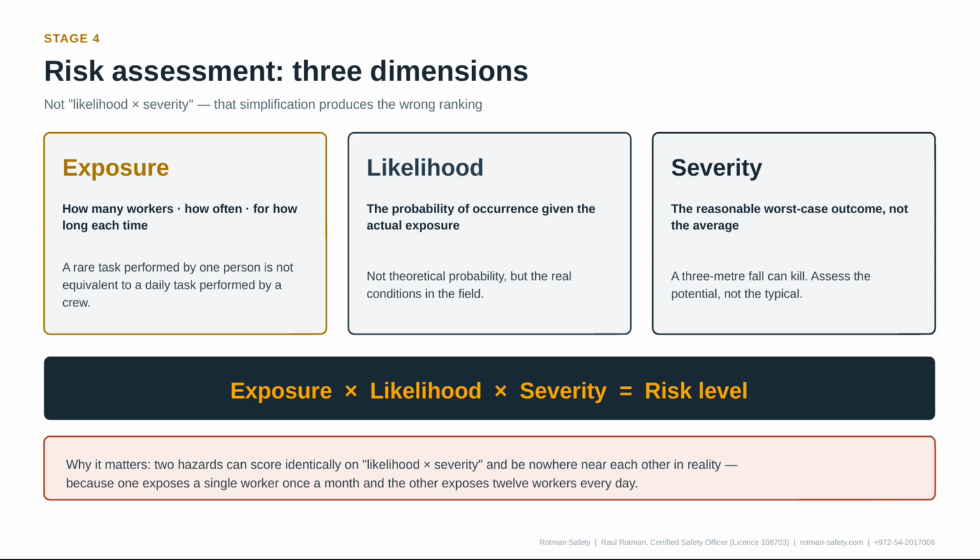Run only one cut and you will miss things. The worst hazards appear where the 3 intersect. For example, a welder working inside a shaft. Identification itself is done against a structured, closed taxonomy, not against whatever comes to mind. What is not on the list will not be examined.